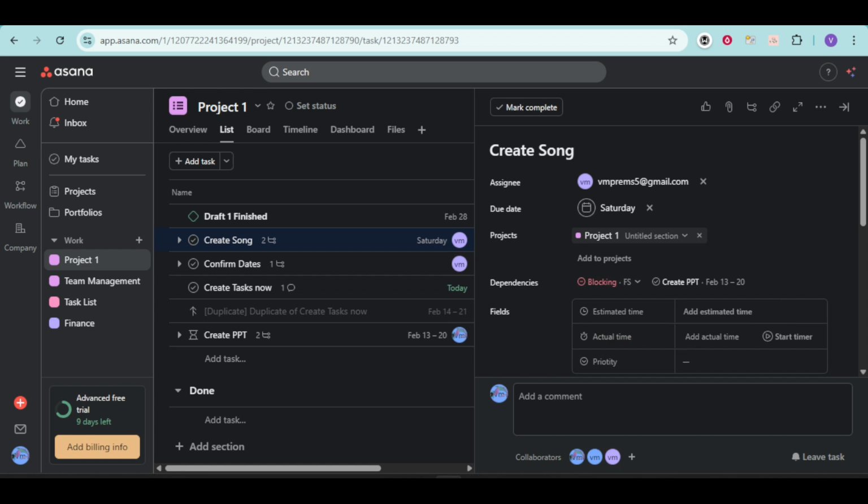Once this is set, Asana displays a clear indicator on both tasks, and teammates can see at a glance what's waiting on what. When the precedent task is completed, the dependent task will reflect that it's unblocked, which helps keep momentum without extra check-ins. Use this simple flow whenever you need to clarify order of operations, streamline handoffs, and keep project timelines reliable.